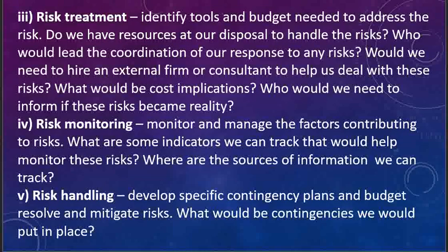Risk treatment. So in strategies to mitigate risk or identifying risk, we are going to have risk treatment. Identify tools and budget needed to address this risk. Do we have resources at our disposal to handle this risk? Who would lead the coordination of our response to the risk? Would we need to hire an external firm, maybe insurance or a consultant, to help us deal with these risks? What would be the cost implications of this risk? Who would we need to inform if this risk became a reality? So that is risk treatment.